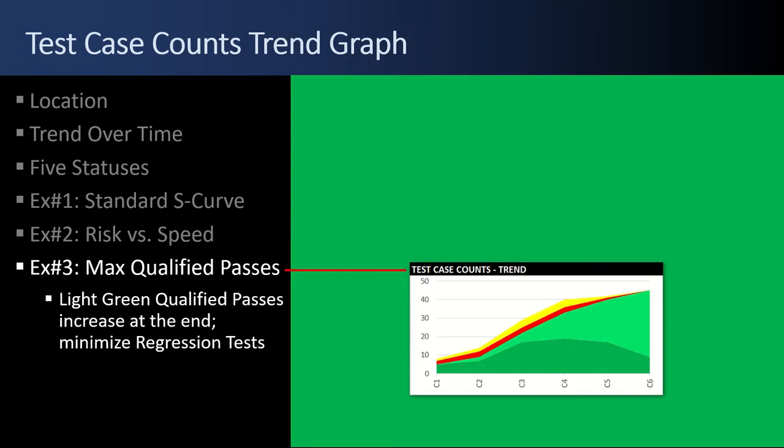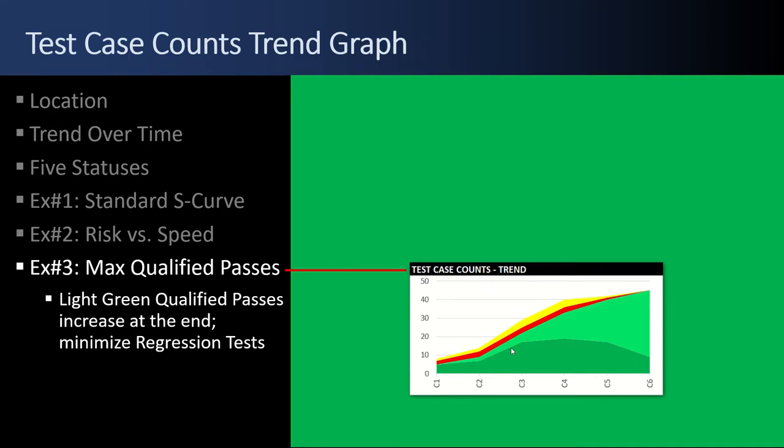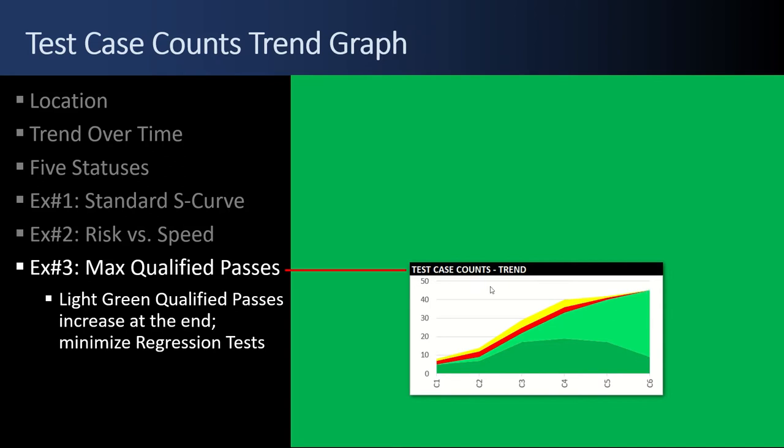Example number three. Maximum qualified passes. You'll notice that as the test cycles went on, there were a lot of test cases that were skipped and assumed to be okay. So this particular project, they're minimizing the regression tests. But if it was a critical project, you wouldn't want to have that much exposure with qualified test cases.